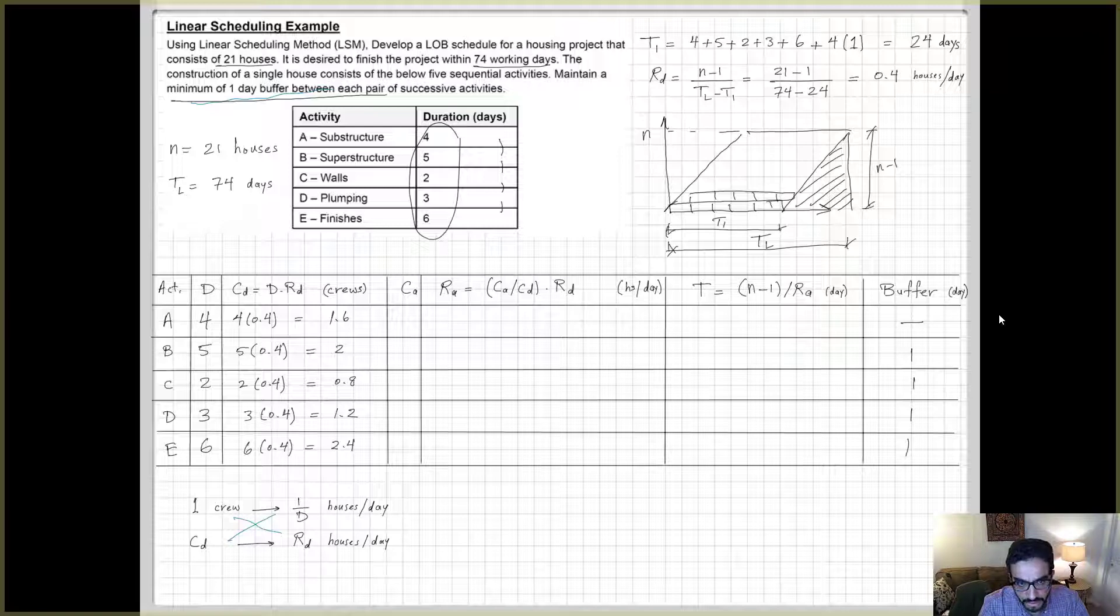You cannot use, for example, 1.6 crews or 0.8, so you have to round up. So CA, the actual crews that you use, are the round up of CD. So 1.6 will turn into two and the rest you can see. We're lucky to have for B the required crews to be two, so we just stick to two in this case.